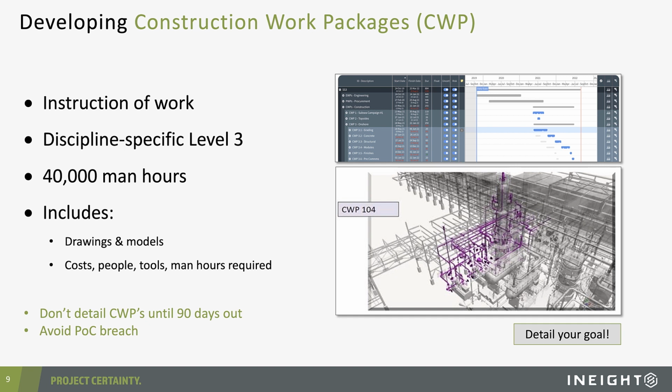I think another interesting point to note about the definition of CWPs is there is a thinking that says, look, don't bother defining your CWPs until we are no more than 90 days out from actually executing the work. And I think the reason behind that is understandably sequence may change, even scope may change.